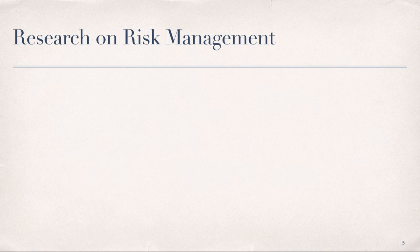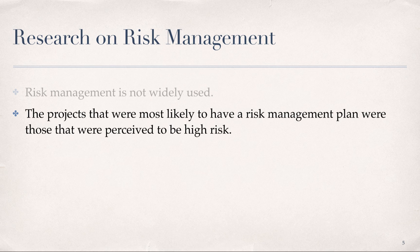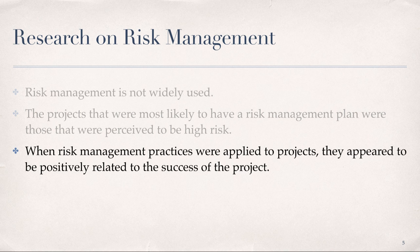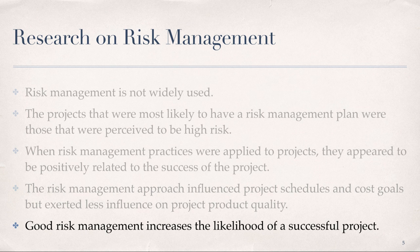A study was conducted on risk management practices over 100 projects covering a variety of industries. The results suggest the following: risk management is not widely used. Projects that were most likely to have a risk management plan were those perceived to be high risk. When risk management practices were applied to projects, they appeared to be positively related to the success of the project. The risk management approach influenced project schedules and cost goals, however it exerted less influence on product quality. And finally, good risk management increases the likelihood of a successful project.